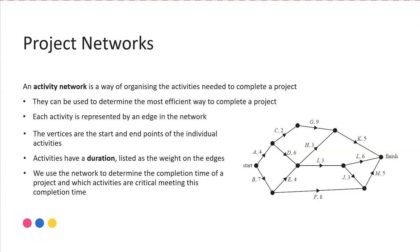We generally represent these projects as a directed network. Some of the key differences is that we label our edges as opposed to the vertices. Each of these edges in this network represent a different activity, and the number is the duration or the weight on the edge. So activity H might take three weeks.